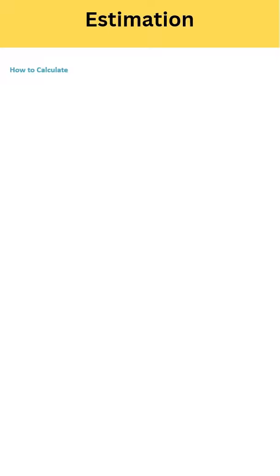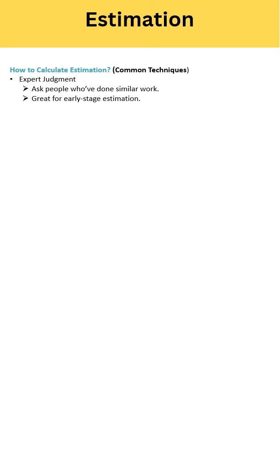Here we have a discussion with an experienced team member or subject matter expert who has worked on a previous project similar to the current project. They can give you an idea, like for the previous project we spent 2 or 3 weeks, so for this current project we may spend 3 or 4 weeks. Here, based simply on experience, we estimate the entire thing.